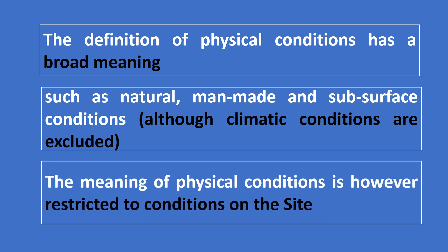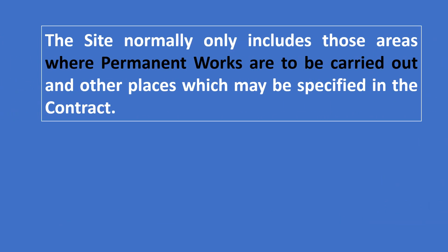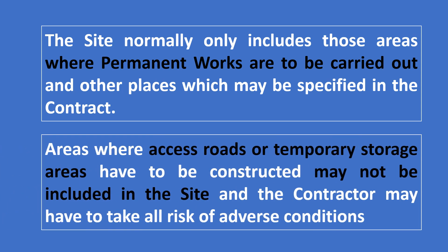The meaning of physical condition is however restricted to conditions on the site. The site normally only includes those areas where permanent works are to be carried out and other places which may be specified in the contract. Areas where access roads or temporary storage have to be constructed may not be included in the site, and the contractor may have to take all risk of adverse physical conditions.